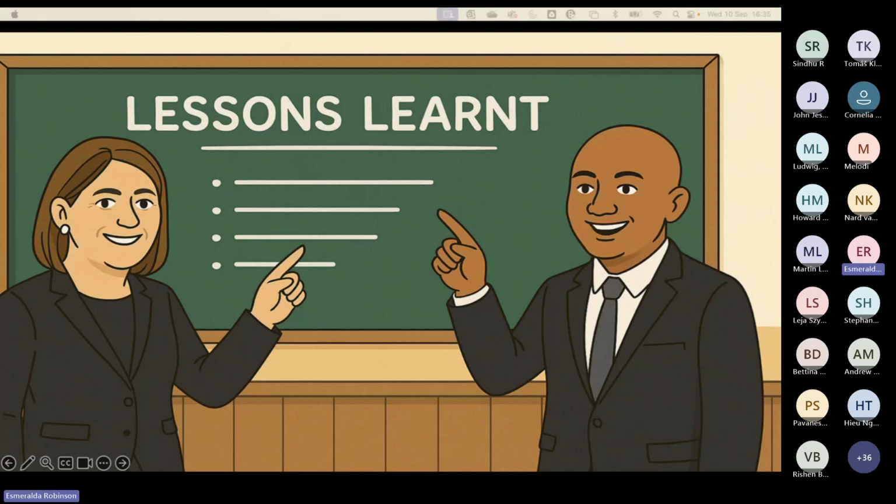Second thing to take note of, responsibilities. Make it clear from the start who's responsible for what. Without this, many balls get dropped as you think, oh, someone else must be doing this, so I don't have to worry about it. So get those responsibilities sorted as well. Testing, of course, very important. Make it clear what needs to be tested and by when. Don't just let people loose on the system and say, go and test. Because with that approach, you get an issue list a mile long, and 99.9% of those are not relevant test cases anyway.